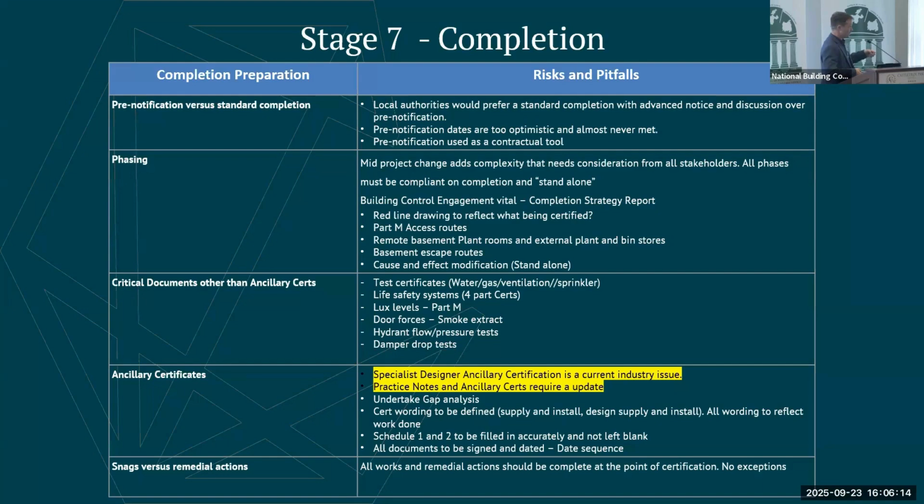Another aspect of that is when you lodge your CCC, whether you do or not get an inspection from building control. Even on some projects I've had a drive-by where, if there's a lot of work taking place at your completion stage after you've lodged it, they'll just give you a phone call saying you're clearly not done yet. There's men on with hard hats and high-vis vests working away on site. There's building materials stored in the common areas. You've Harris fencing up. You're not done.